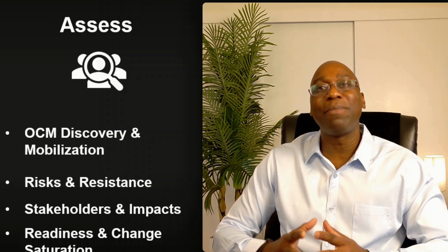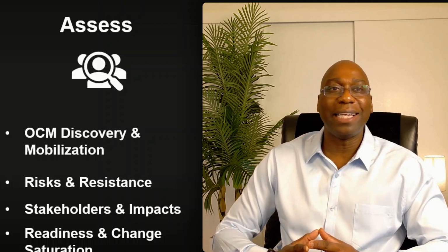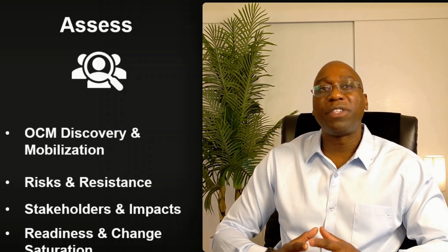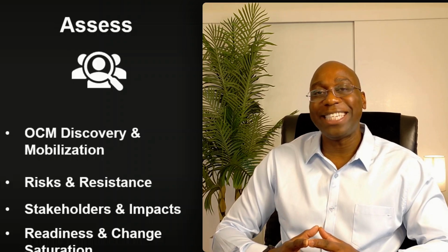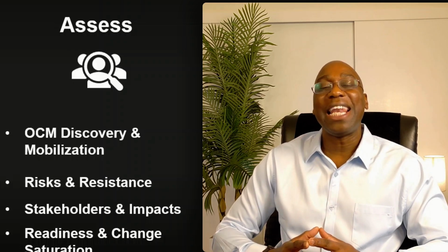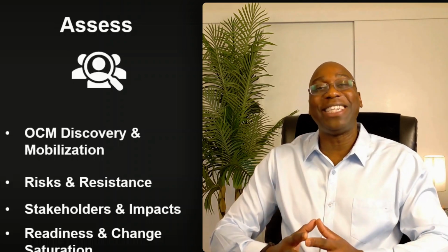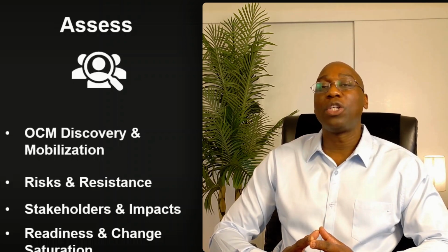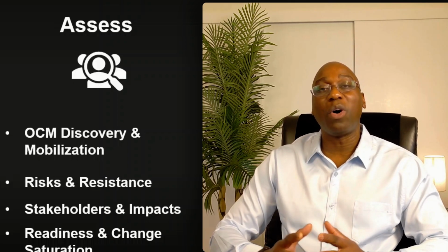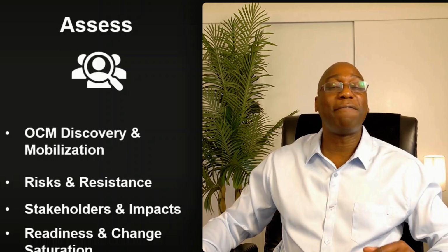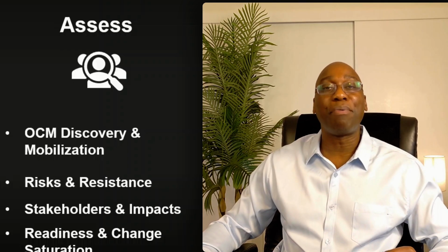During the assess phase, you or the change practitioner want to conduct what we call organizational change management, which is OCM, discovery and mobilization. This involves ramping up the change team or resource, aligning with project objectives and scope, and conducting discovery to understand the driving factors behind the project.